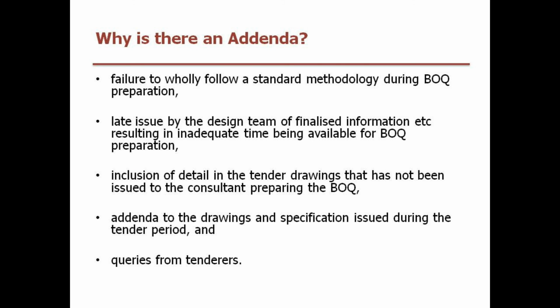A common question is, why is there an addenda? Now, that's quite a good question, but with the race to get documents ready, to get the bill measured and so forth, when measuring the bill, it's quite often that there's inadequacies or differences found amongst the documentation. Sometimes it can't be included in the bill of quantities up to tender.